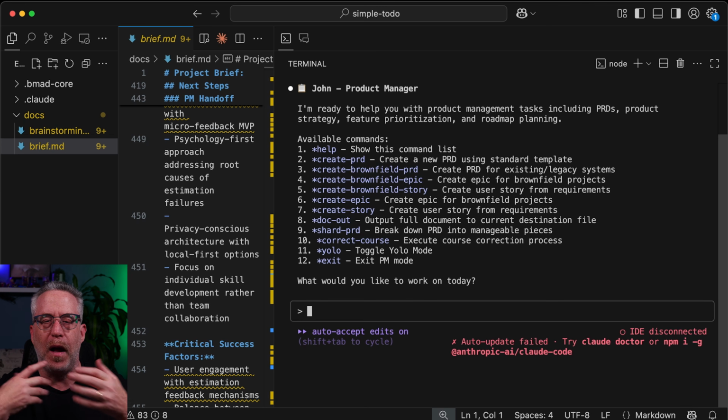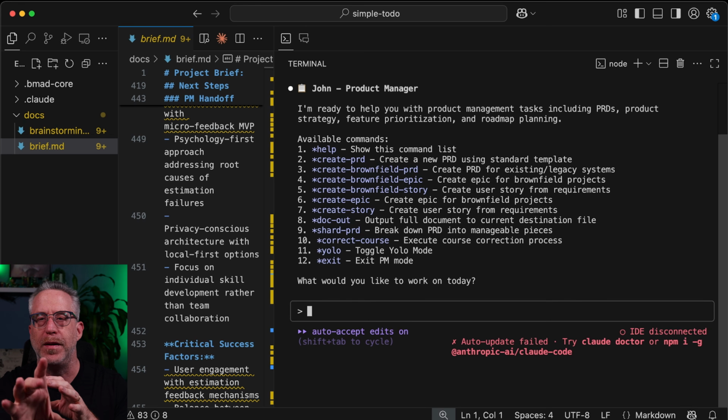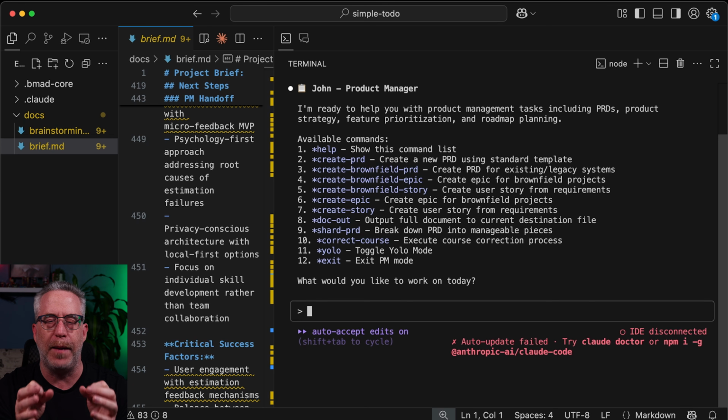Secondly, it's going to help work with us to figure out what is in scope for the MVP and what we can potentially pull out to have post MVP. Because if you can make your app the simplest version of the app that you can make that will meet the initial goal, that's less risk, less investment in a product. Maybe you want to get it out there with just a minimum set of features to test it in the market. That's why you want to build an MVP or minimum viable product.